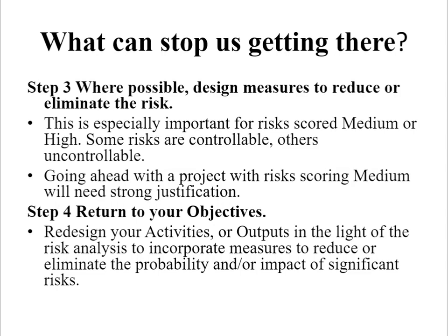Step number 3, where possible, design measures to reduce or eliminate the risk. This is especially important for risks called medium or high. This is not applicable to risks with low score because some risks are controllable and others are not. Going ahead with a project with risks called medium will need strong justification.